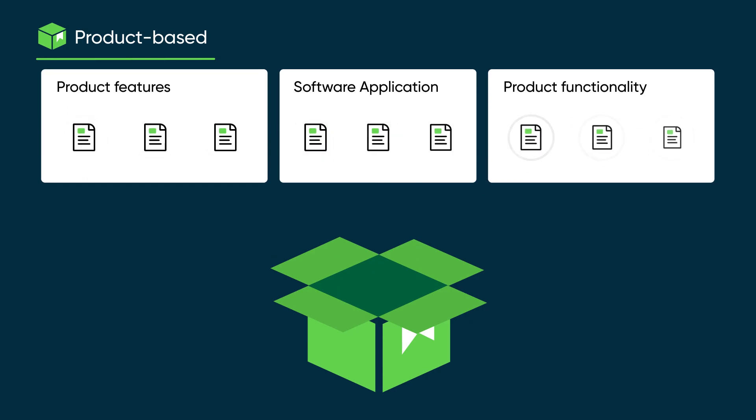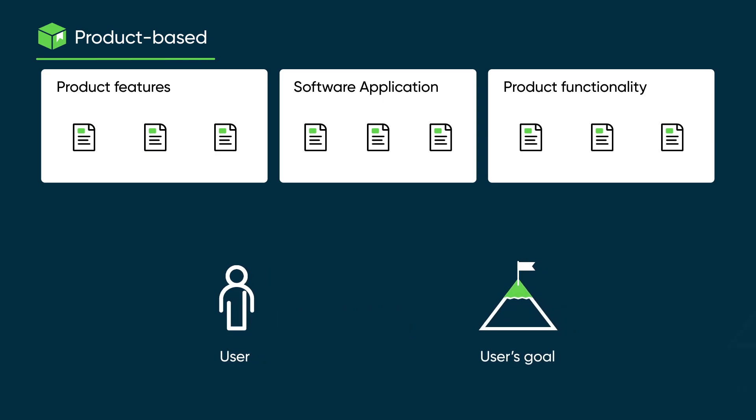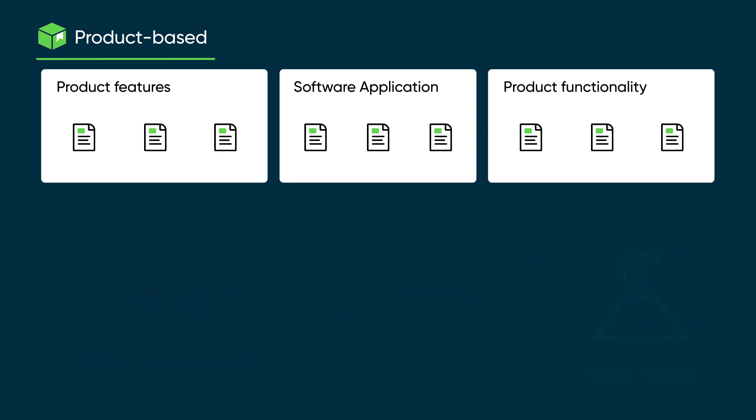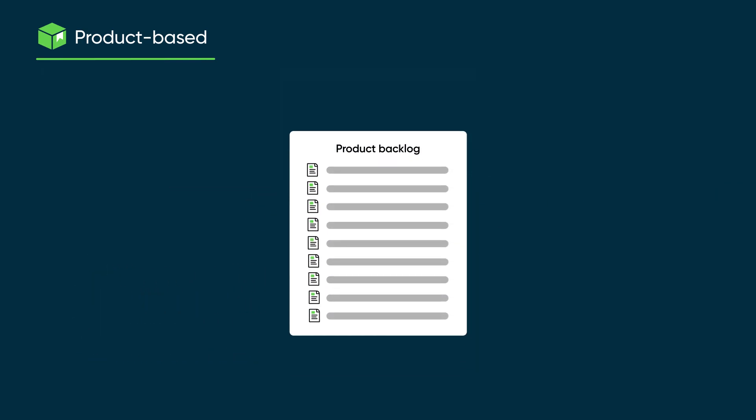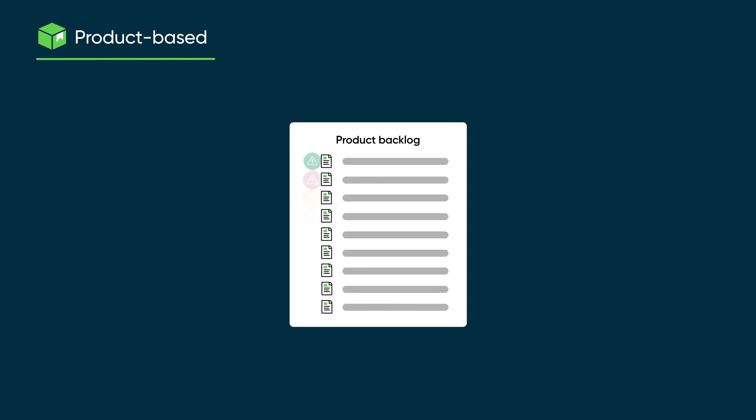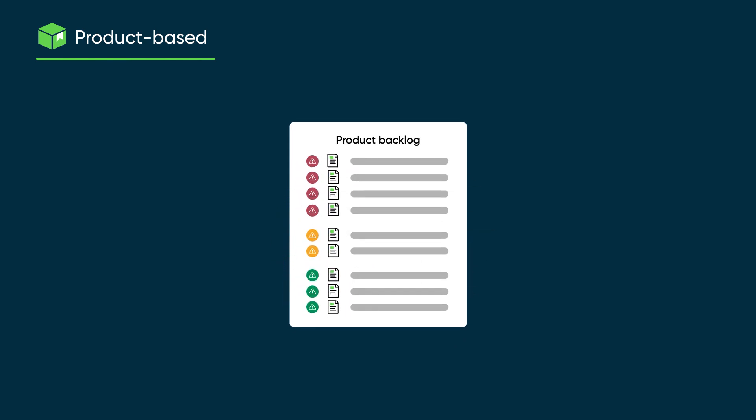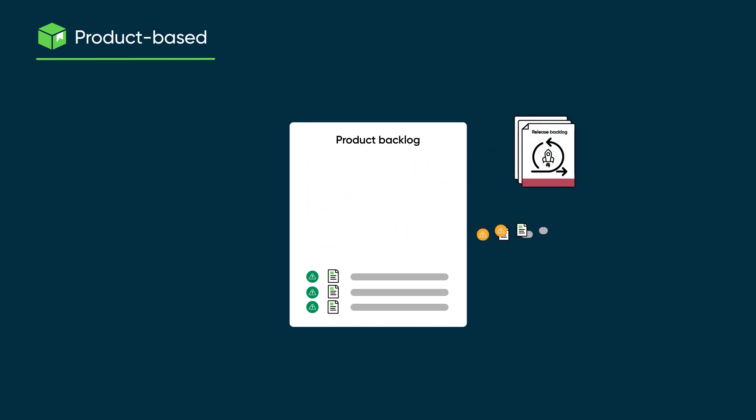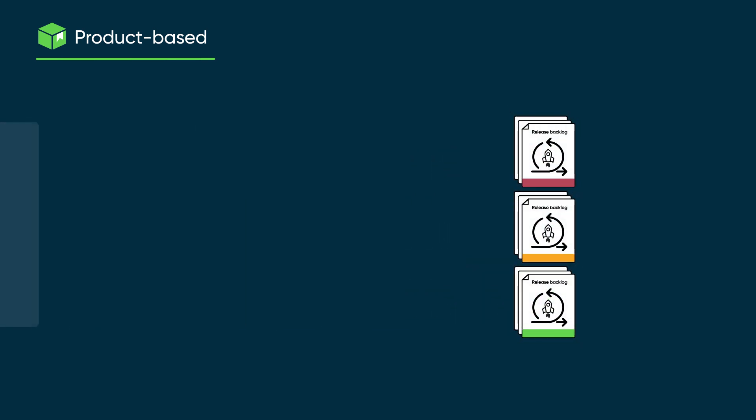These features become Agile stories that identify the user, the user's goal, and the reason for the goal. These stories make up the backlog for the product. The product owner prioritizes the stories and combines the highest priority stories into a release backlog organized into themes and epics.